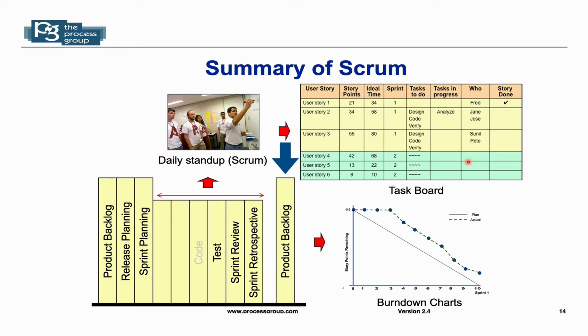On the far right part of the diagram, we have the product backlog again, so we can revisit that. It may have changed. We pick out new work off that backlog. We go through sprint planning, the iteration, test, release, etc., and get feedback again on our second piece of work. So that's a recurring theme of activities that we go through for Agile.